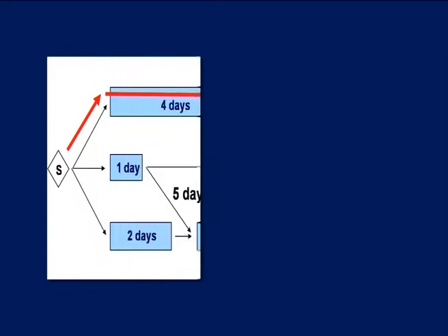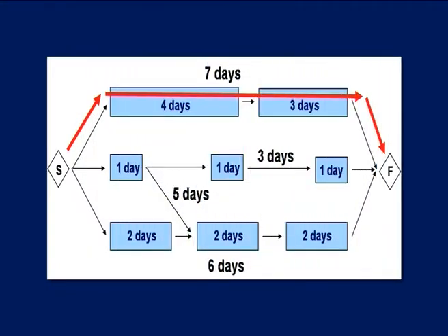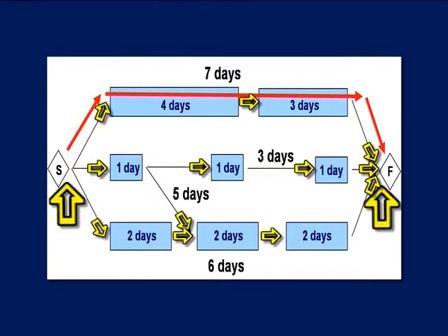Critical path is the longest path through the project network. The activities on the path are the critical activities. Therefore, any delay in their completion must be avoided to prevent delay in project completion. The objective of critical path analysis is to estimate the total project duration and to assign starting and finishing times to all the activities involved in the project. This helps to check the actual progress against the scheduled duration of the project.